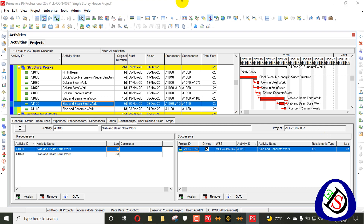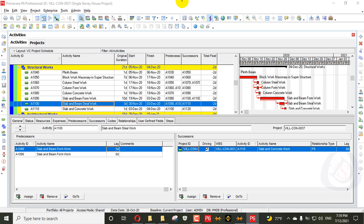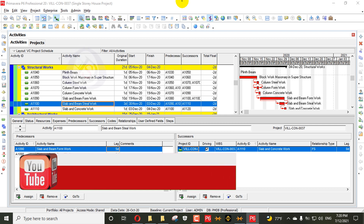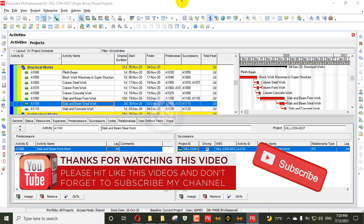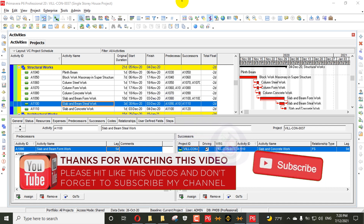So dangling logics are now clear. Every proficient scheduler's goal is a dynamic schedule that correctly calculates activity dates when duration changes, work slips, or completes out of sequence. This requires a schedule with no missing logic. Achieving that requires more than confirming activities have both a predecessor and successor: when a sole start-to-start connects two activities, you additionally need a finish-to-finish or finish-to-start further downstream; when a sole finish-to-finish connects two activities, you additionally need a start-to-start or finish-to-start further upstream. We will discuss how to find lags, open-ended activities, and danglings in large projects in the next video.